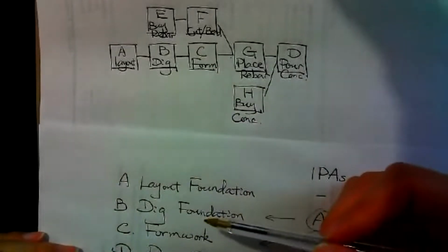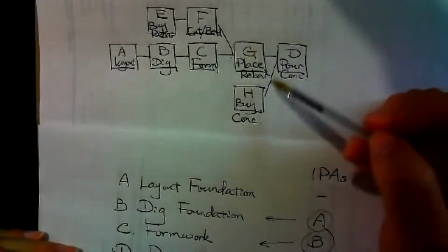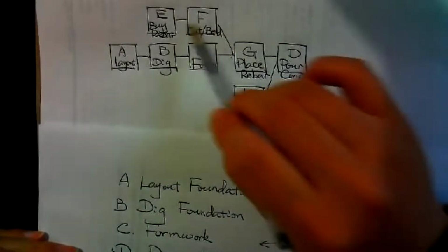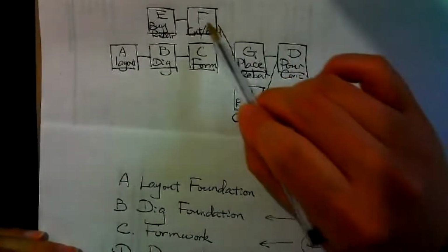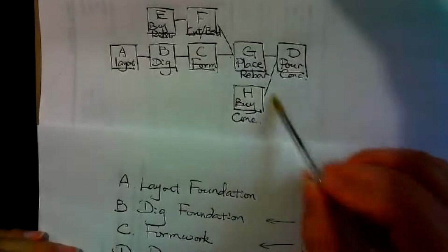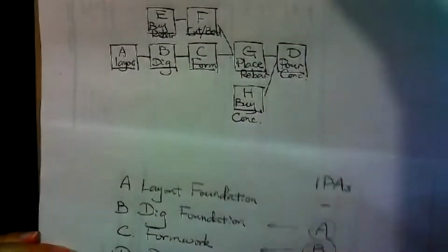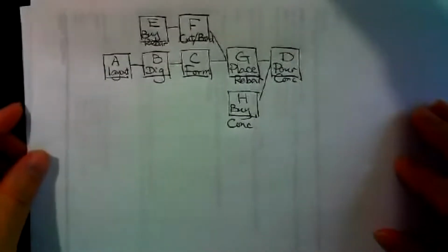The only hard part is those branches. If an activity has two predecessors, you need to follow that branch until it reaches a procurement activity. You can stop there, then go back to the main trunk. Okay, that's the analysis procedure. If you didn't write it down, that's okay. The next page of my notes provides you the correct answer. If you want practice, you can do that.